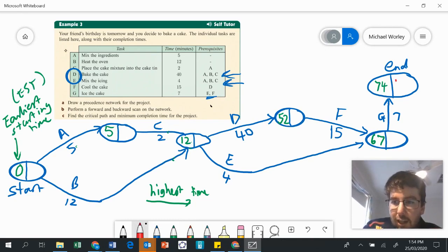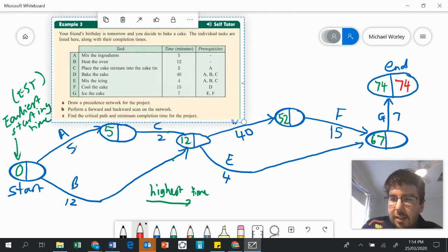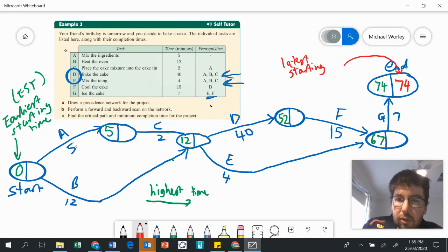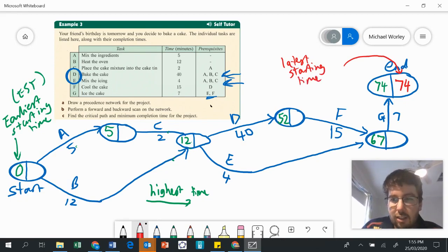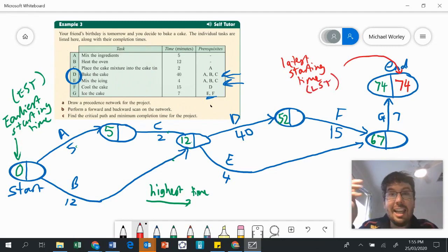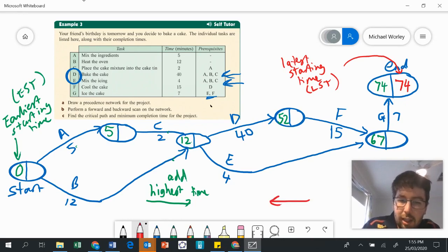Now we're going to do our backward scan. To start our backward scan, we copy the same number we finished with — 74. The red numbers on the right hand side are going to indicate the latest starting times, or LST — the latest you can start a task without causing a delay to the overall project. When we were going left to right we added, but when we're going from right to left on our way back, we take away.